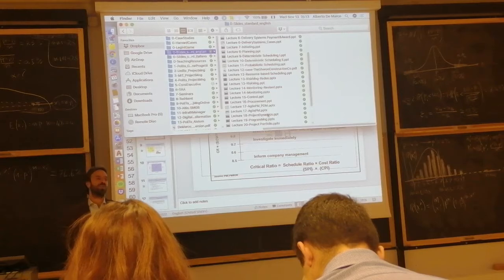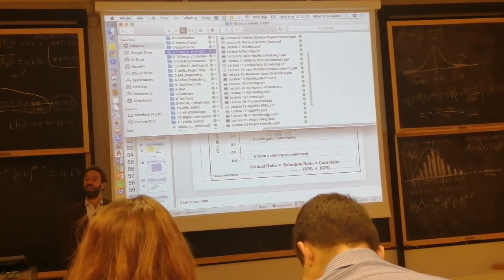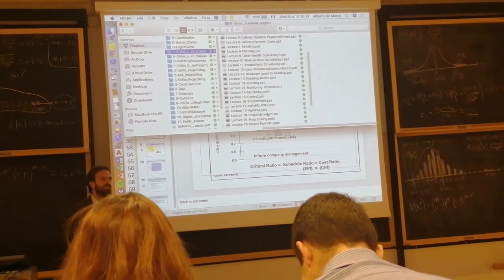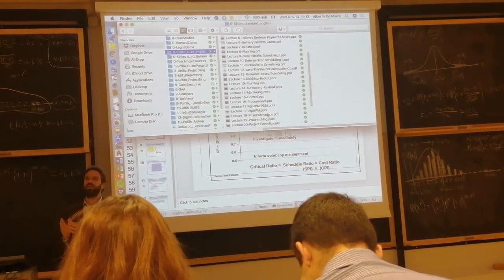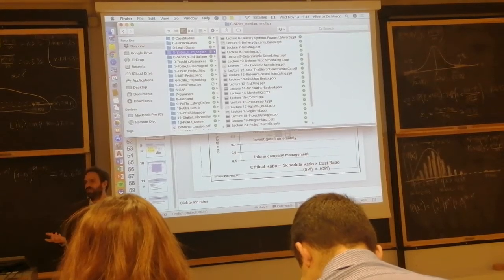How do you measure progress? Number of hours spent in laying down the cable? Number of kilometers made. Out of 3,000 total, now we did 1,000, so we did 33%.